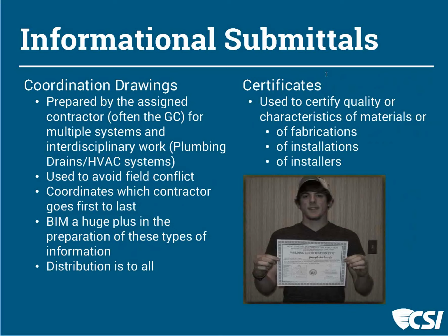Things weren't thought out in advance of having conflicts in the field. So that's a type where we want to see the assigned parties from the constructor side communicating and coordinating prior to installing the work. And then with certificates, we want to be sure that the people that are doing the work are qualified to do the work. So we want to see that they are, in fact, certified, that they have passed some performance kind of test, and that the people that are on the job are, in fact, who we want to be putting the structure together.